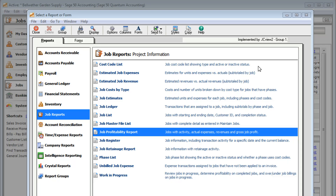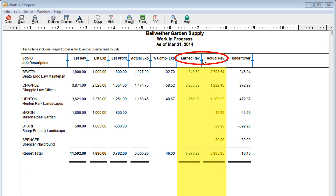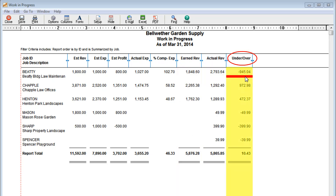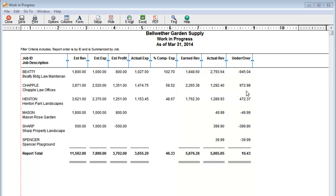Or maybe you want to see if you are overbilling or underbilling your customers — look at the Work in Progress Report. Stay on target with how you bill customers by comparing your earned revenue and actual revenue. If you're overbilling, your actual revenue — what you've billed the customer — is more than the revenue you've earned. The opposite of this is underbilling. Use this report to determine if you need to make adjustments to your job billing cycles.